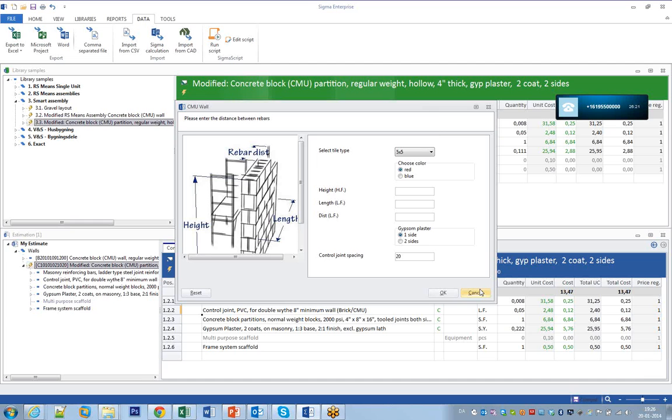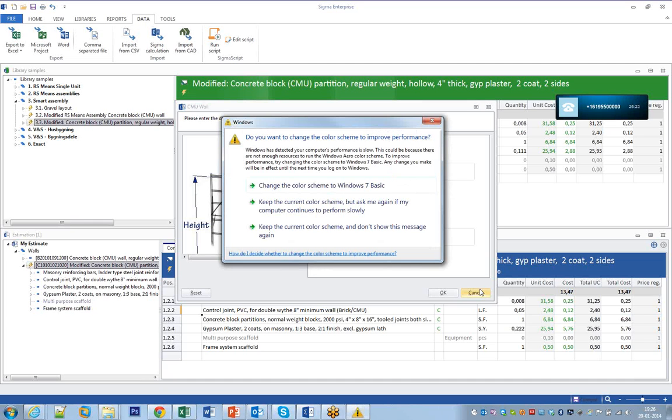So if it's 12 weeks or less, we don't need a trailer. If it's 12 weeks or more, we want to add a trailer to the bid. And for every week, I need 40 hours of supervision. I need temporary utilities, water, 2 porta potties, portable toilets or whatever, and then it just takes that 12 weeks and extends out exactly what I need.